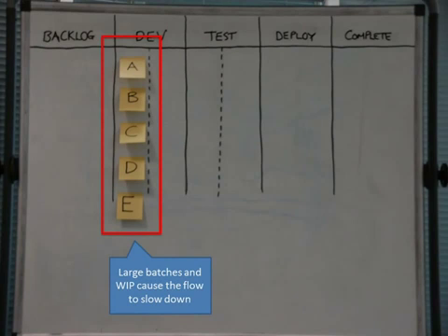And like I said before, large batches and work in progress, working on a lot of things at once, really slow things down. If you're a developer, though, you might think it's really cool because I can start on lots of things and I'll probably get them done and I'll work a bit late and what have you. But they tend to have a view of only the development part of this. You ask the testers: they're sitting there, and at the end of the month, they're meant to get a week to test before it goes live if you do a monthly release. They're meant to get it on the Friday before the week for testing. But typically, they try and deploy it on the Monday, and it doesn't work, and then Tuesday afternoon, and it's still not working. You get it on Tuesday evening, then on Wednesday, they've actually got 3 days to test. That's the problem with batching up.